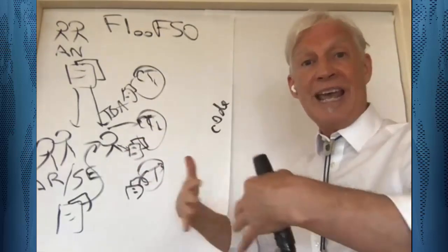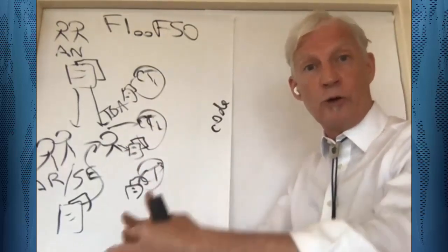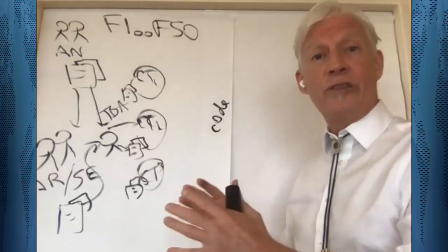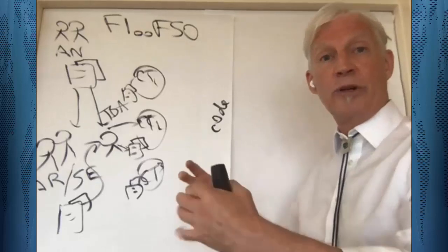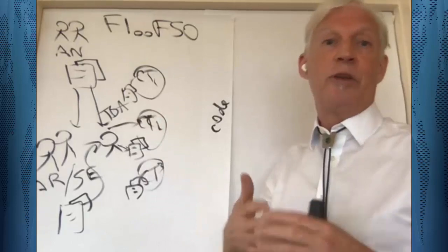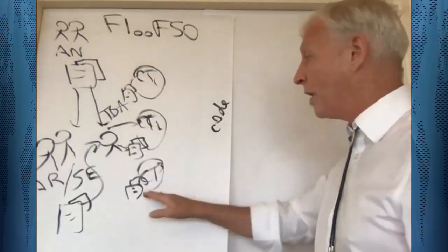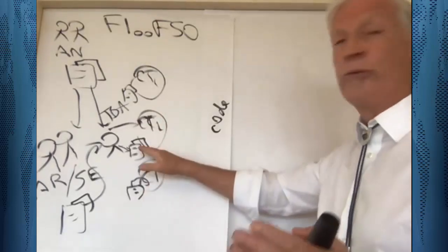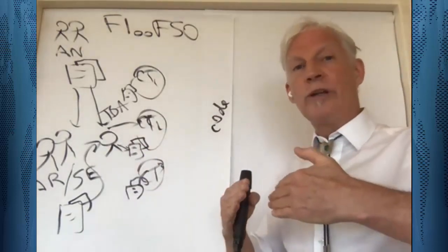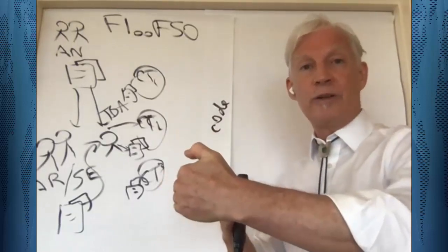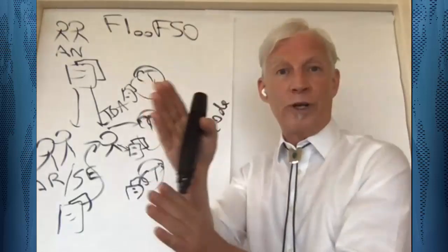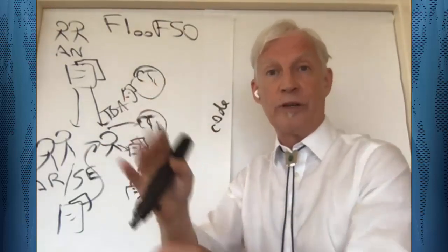And so we have kind of an asynchronous activity with respect to the code being created for different requirements. A second reason why you've got this asynchronous work going on in different components with different component teams is that not all of these component tasks are exactly 17 person hours long. One of them might be 17 person hours, this one might be 100 person hours, and so on and so forth. And as a consequence, the work of the different teams with respect to the code is happening asynchronously. They're not all in lockstep working on the same code for the same requirement all at the same time.